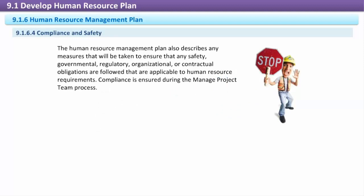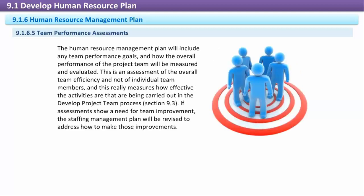Compliance and Safety: The Human Resource Management Plan also describes any measures that will be taken to ensure that any safety, governmental, regulatory, organizational, or contractual obligations are followed that are applicable to human resource requirements. Compliance is ensured during the Manage Project Team process. Team Performance Assessments: The Human Resource Management Plan will include any team performance goals, and how the overall performance of the project team will be measured and evaluated. This is an assessment of the overall team efficiency and not of individual team members, and this really measures how effective the activities are that are being carried out in the Develop Project Team process (Section 9.3). If assessments show a need for team improvement, the staffing management plan will be revised to address how to make those improvements.